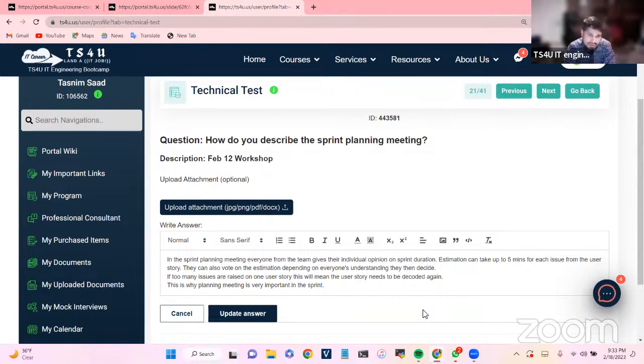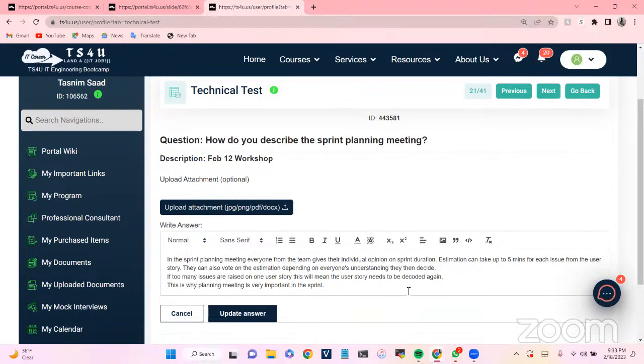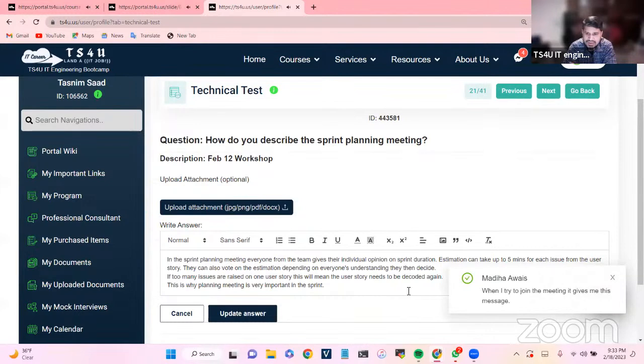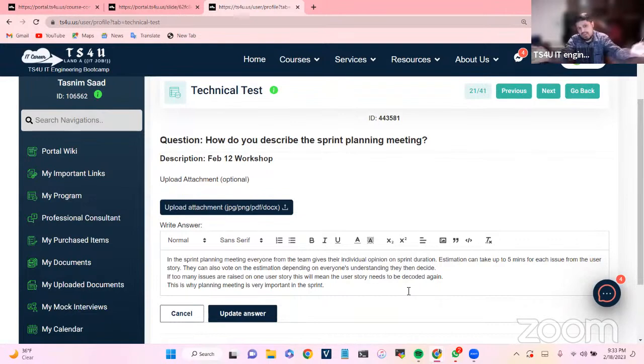Okay, so if I'm telling you, in the planning meeting the product owner or the scrum master brings the high priority user stories. That's the way in software development, the whole team meets for 60 minutes or 90 minutes, and we start estimating each of the user stories. Before you estimate anything, of course, you need to raise questions. So the product owner says, hey, this is the user story. It seems like this is what you have to do. Anyone has any thought? So everybody just talks.